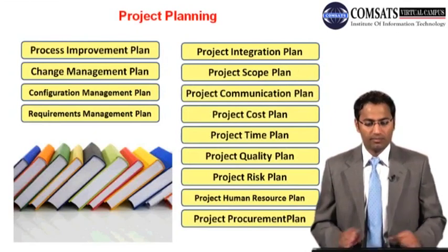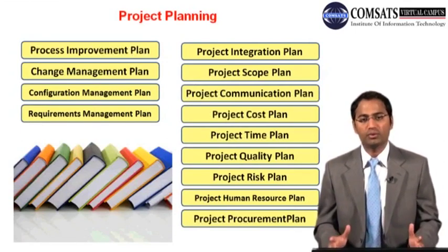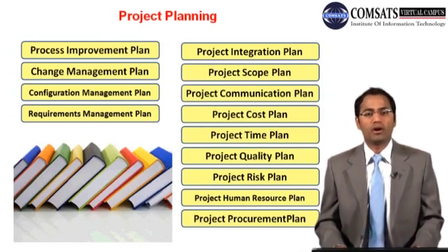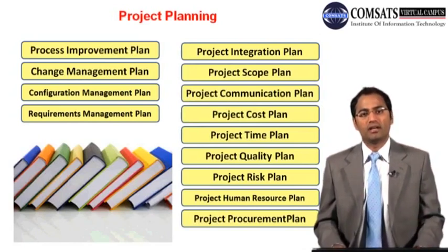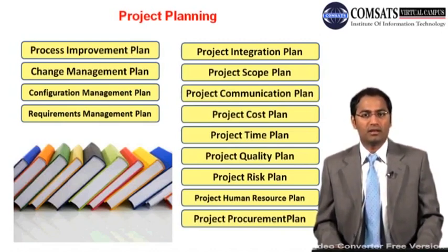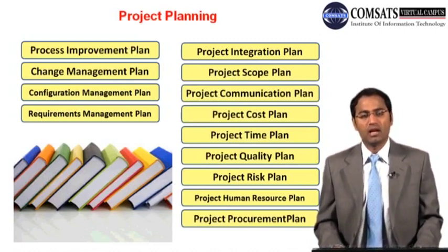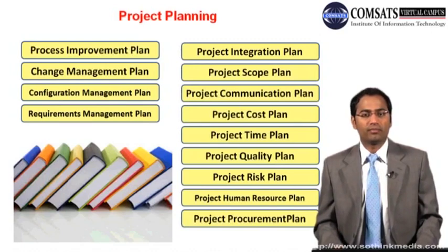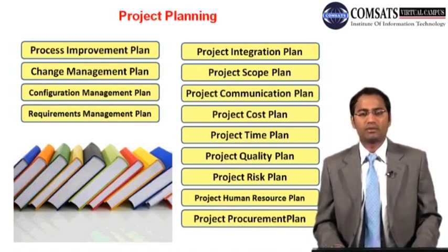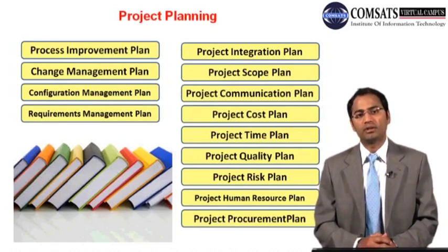The output of project planning is the project management plan and project documents. What you are doing through that process: you are collecting detailed requirements, then you have the scope statement, and then you are creating the WBS, and then you are assessing who is to work and when to work. You have that team concept with you, and you create the project activities through the WBS with the help of your team, and then you carry out the necessary time management activities, like creating network diagrams, applying CPM methodologies and scheduling,